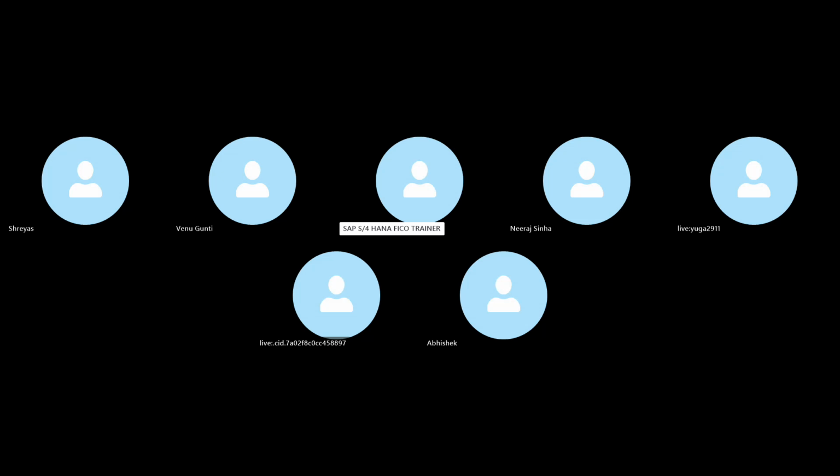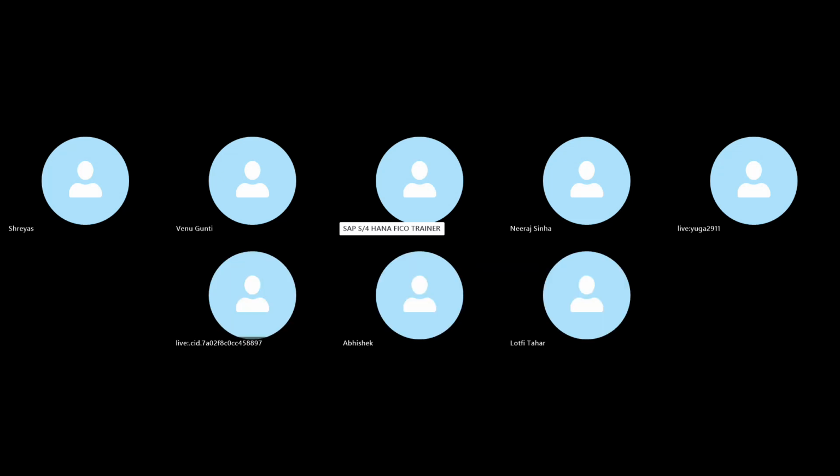Because many freshers make this mistake. They will configure, and they'll forget what they have done because they do not note it down. Then in the next system, they will start getting errors, while in the development system, in the unit test client, they did not get an error. Then we raise the same question: why are you not getting the error in the unit test client, but you are getting it in the UAT client? The reason is they forgot what they did in the unit test client and forgot to do the same thing in the UAT client. And they're not remembering because they are not superhuman beings.